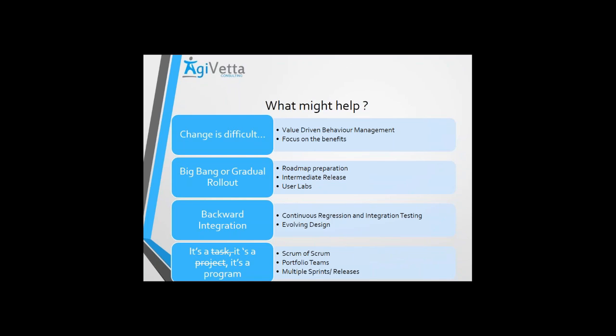and check the user inputs and user feedback. Whereas in other systems, for example, if you're working with a bank, you cannot really simulate and push your new solution. You might want to set up a user lab and then invite different end users who might use this data. Correct? So work on some sample data sets, or a copy of your production data if you can really source it. This is where you need business help also, to continuously help you upgrade that data.